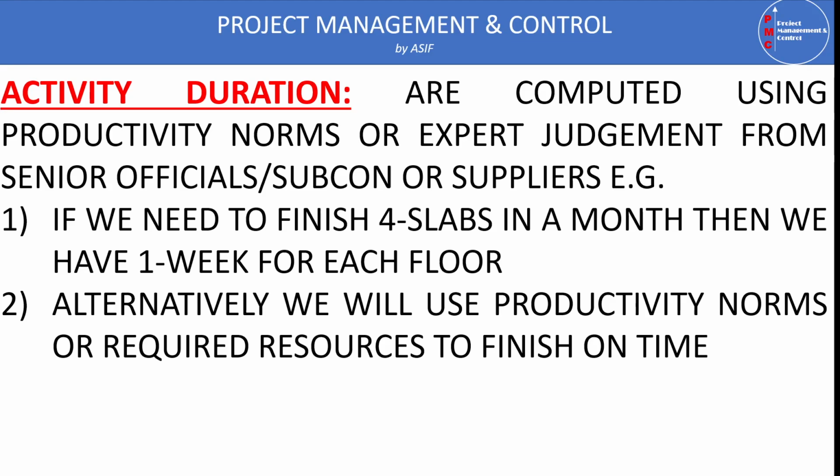If you have a time constraint, you have to increase the resources, or if you have a resource constraint, then you have to increase or adjust the time. So alternatively, I just say that if you have a time constraint, we can compute the activity duration easily using the time. But if we need to compute the resources, we can use the resource productivity norms to compute the activity durations.